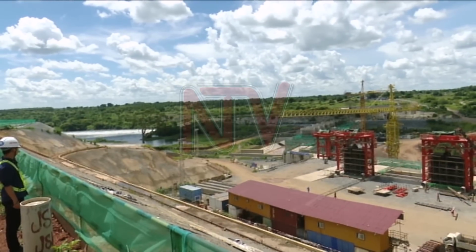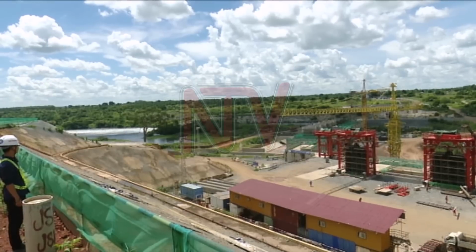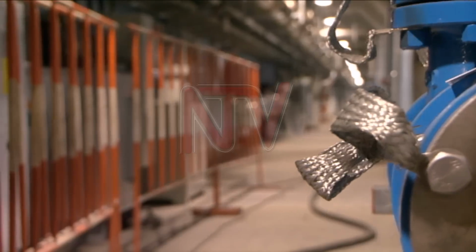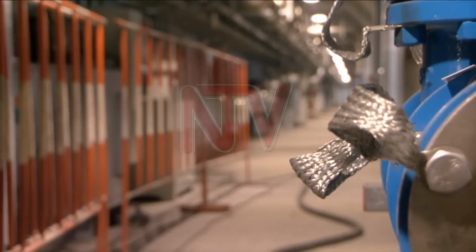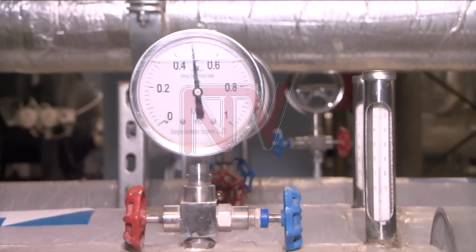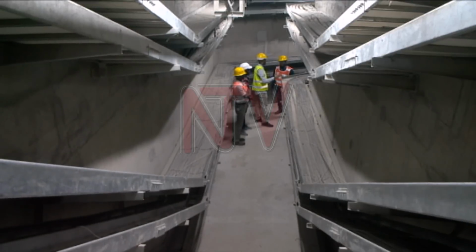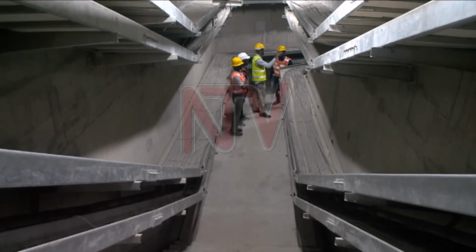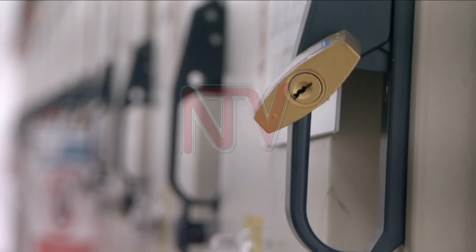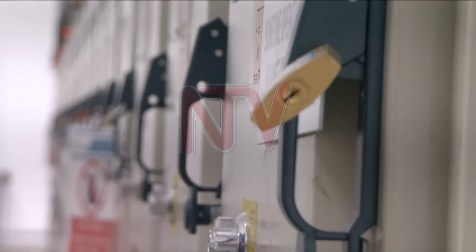The COVID-19 pandemic, which struck in early 2020 and extended into 2021, crippled construction works at the time the government and the contractor clashed over electromechanical installations, especially cabling, whereby the contractor installed wires which flouted the design standards or specifications applicable. There were instances where the cables were bulging and were not labeled. The contractor had also installed plastic glands instead of stainless steel as specified, and some of the equipment gathered rust.